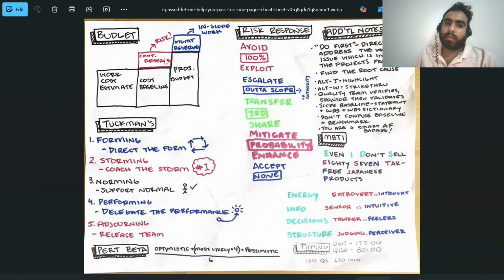Okay. But in the real world, what the project budget actually considers is the cost estimate plus baselines plus management reserves, which means that the management will put aside some additional funds so that if any unknown risk occurs, they are going to give money from the management reserves. This is the entire summarization of the budget planning.